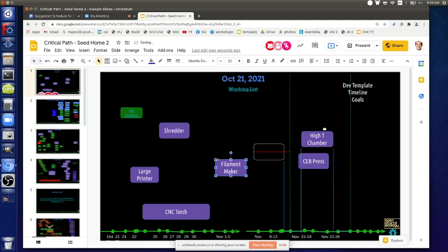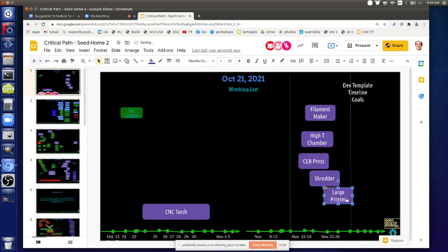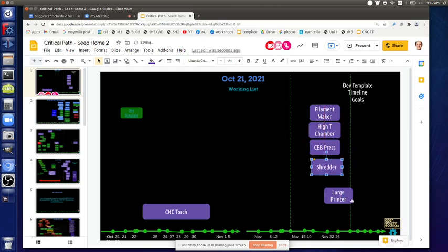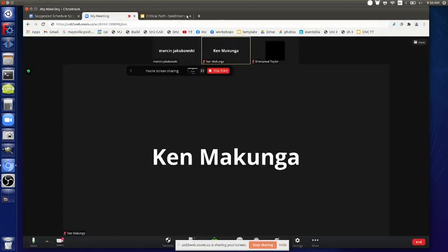Say it again. So hopefully the torch doesn't take another 5 days. The hope is that it doesn't actually take the whole week to get that done, so that we can do more in that week. Also, I think critical path is important now because it's kind of changing, or it could potentially change. Like if we order blades for the shredder instead, then we don't need the torch to make the shredder, right? And so that could potentially change how all these come out. So again, this is just a straw man, you know, figure out what works best.